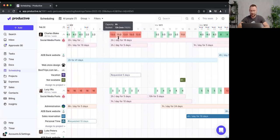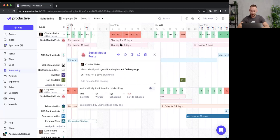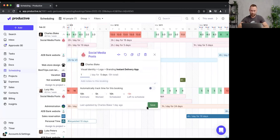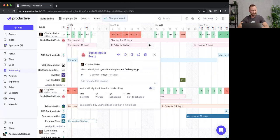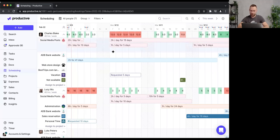Looking at Charles — that doesn't look so good. His capacity is eight hours, but I've booked 13 hours and two minutes so far. I should either reduce the hours allocated to Charles, move the booking to a different person, or remove it altogether. Let me reduce the hours — but I'm still left with 12 hours to reassign.